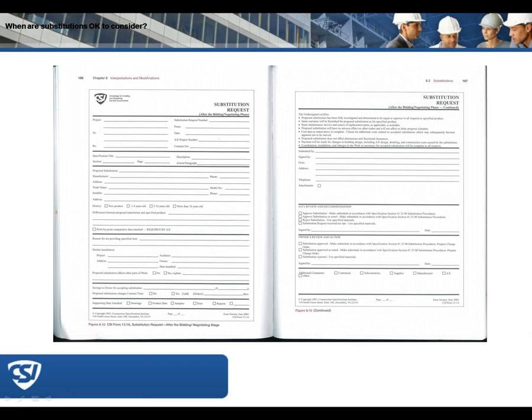So if there are any associated or related issues, everything about this product and how it touches the building is to be consistent with the existing contract documents. And so those are the things that the contractor is certifying as specific statements of certification when they sign the form.